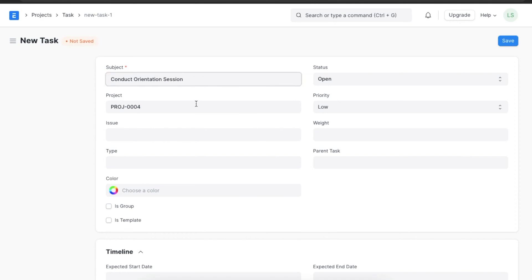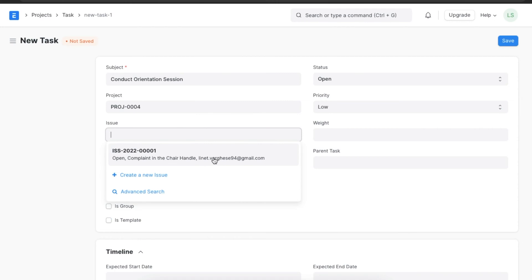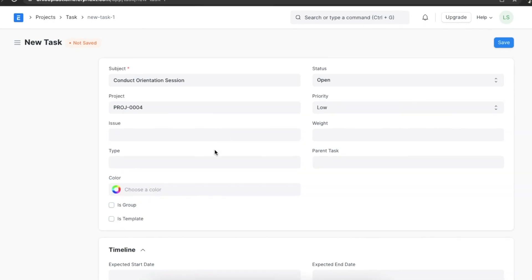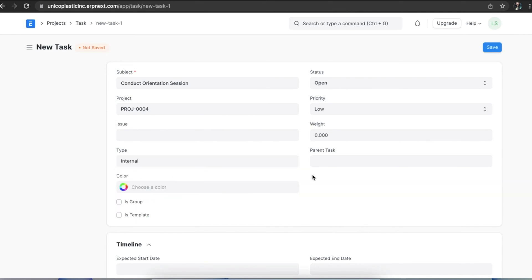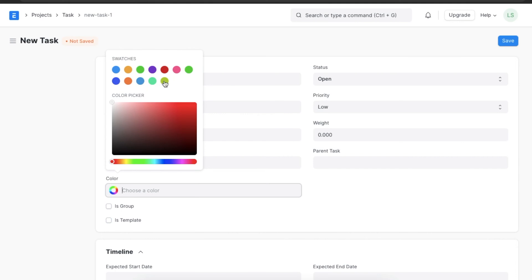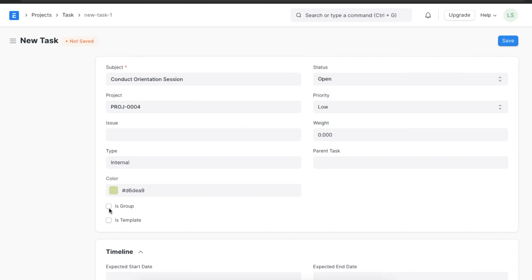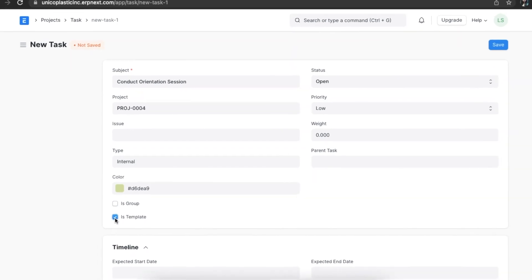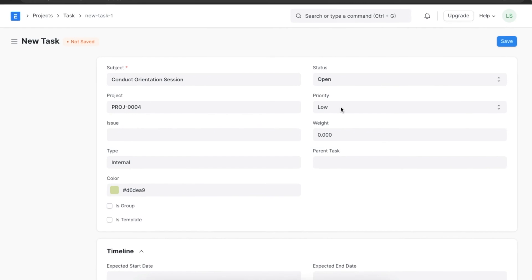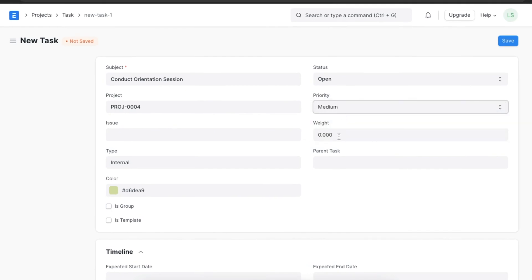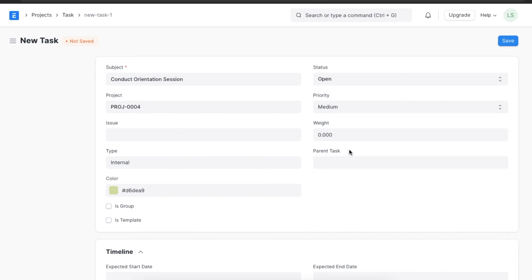The project and status fields will already be filled. If this task is related to an issue, we can link it here. Next, we can define the task type, then pick a color to customize this task, and use the checkboxes to define if this task is a subgroup or a group. If this task is marked as a group task, it will enable other tasks to be created under it. We can also mark if this task is a template task to be used in project templates. Now we can change the task priority, assign a weight to it, and if this task is linked to a parent task, we can add those details under the parent task field as well.